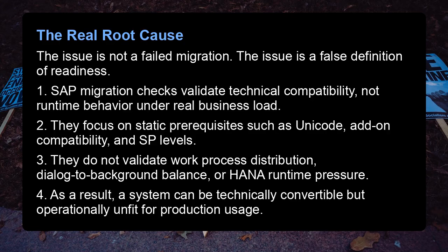The real root cause. The issue is not a failed migration. The issue is a false definition of readiness. 1. SAP migration checks validate technical compatibility, not runtime behavior under real business load. 2. They focus on static prerequisites such as Unicode, add-on compatibility, and SP levels. 3. They do not validate work process distribution, dialog-to-background balance, or HANA runtime pressure. 4. As a result, a system can be technically convertible, but operationally unfit for production usage.